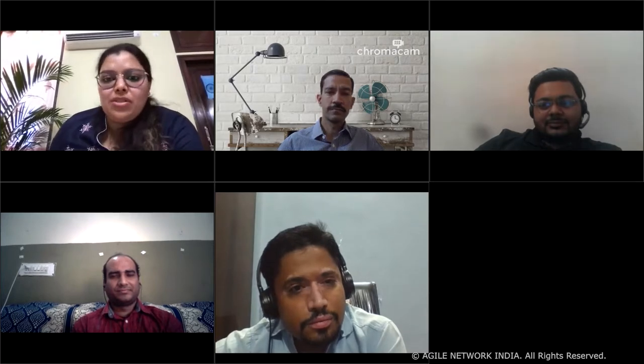Call a spade a spade, call a change request a change request. Don't beat around the bush. If your homework is solid, if your requirement gathering was solid, you have enough data points to tell a customer that what they're asking for is a change request, and once that is agreed upon, I think the process is pretty simple. I usually try to ask them for a trade-off.